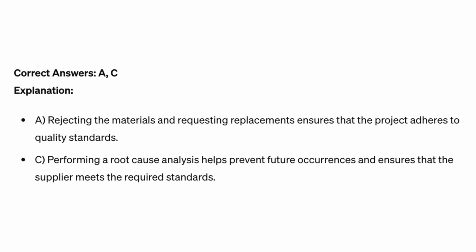Correct answers A, C. Explanation. Rejecting the materials and requesting replacements ensures that the project adheres to quality standards. Performing a root cause analysis helps prevent future occurrences and ensures that the supplier meets the required standards.